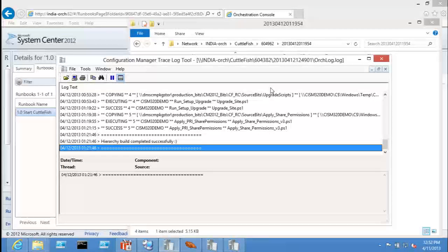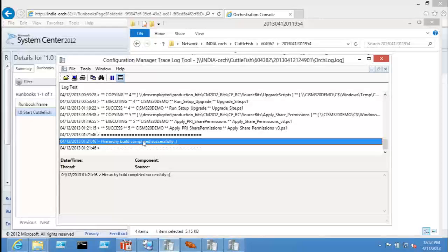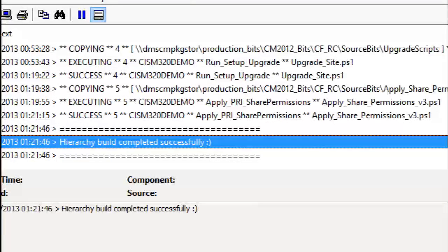But if you have to start the script writing, I will say a month's work for you. For us, it took like 6 months overall, because we didn't have the script in the past. Of 6 months, I'm talking about the final release. In the 6th month also, we started using it from the first month itself and kept adding more and more functionality. But for you guys, it won't be more than 1 month or a few weeks, depending on how much script you have.